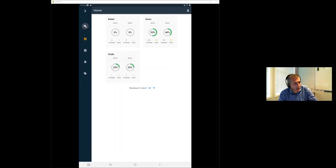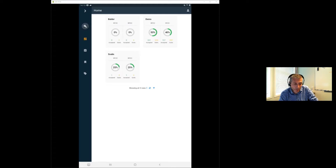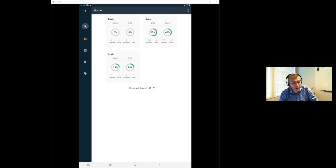An essential part of mechanical completion and commissioning is to physically go out in the construction yard to verify that all equipment — what we call tags, all the components — are installed according to rules and regulations and according to spec. That is exactly what this field inspection app helps you do, using predefined checklists for each type of equipment, all linked to the equipment on site.